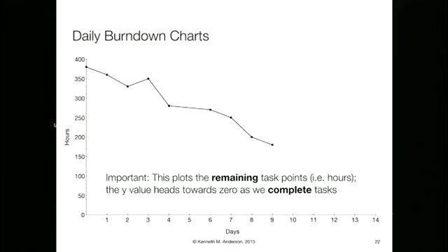But maybe you get ahead a couple days and you see a drop, and then it's staying here, and then we realize there was something else we need to do. Our estimate was wrong, so it goes up. And then we come down. There's all sorts of things you can see. And as you get comfortable with these graphs, they tell a story. Oh, midweek, something went wrong. They stopped making all progress, or they found out something new, and the number of hours shot way up.